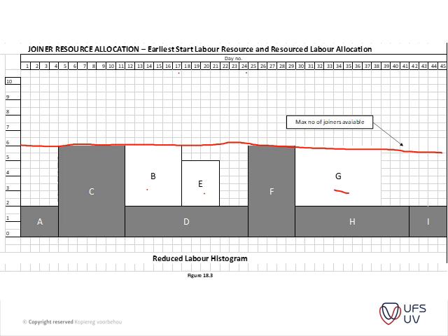This gives the site manager a problem from a labor control point of view, because the joiners may find work on other sites, etc. Basically these joiners have to wait until these guys are done with their work, so B and C. So it's not ideal, but the amount of resources is optimally used by the main contractor, while the subcontractor in the end loses out because he cannot start with his fitting after item B is finished.